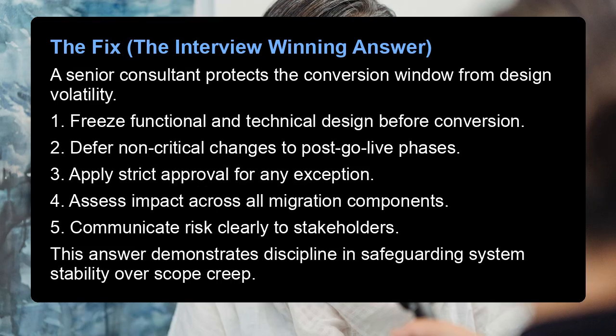The fix, the interview-winning answer. A senior consultant protects the conversion window from design volatility. 1. Freeze functional and technical design before conversion. 2. Defer non-critical changes to post-go-live phases. 3. Apply strict approval for any exception. 4. Assess impact across all migration components. 5. Communicate risk clearly to stakeholders. This answer demonstrates discipline in safeguarding system stability over scope creep.